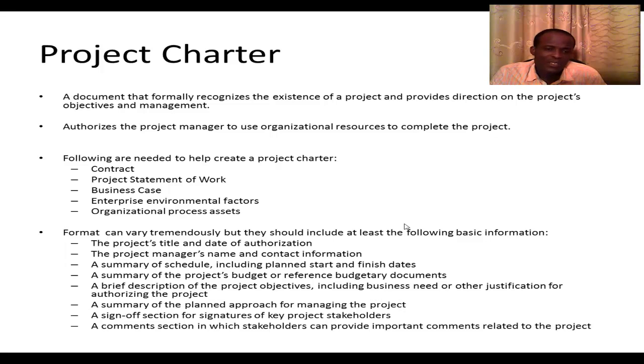Now let's look at what a project charter is. Now a charter is a document that formally recognizes the existence of a project and provides direction on the project's objectives and management. And it authorizes the project manager to use organizational resources to complete the project.